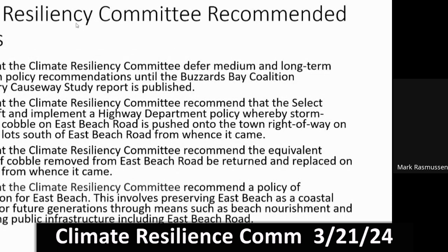The other one was a sense of lead time in project planning and implementation. Say we want to support a beach nourishment project. Sometimes putting that request into the Army Corps of Engineers, you're in a queue for 5 years. Do we not want to put in that request today and not lose that time? So I worry a little bit about letting the town have the flexibility to apply for funds, to make recommendations to legislators for things that may not happen for years, but we need to get in the pipeline. I wouldn't want this motion to restrict that either. Those are my concerns.